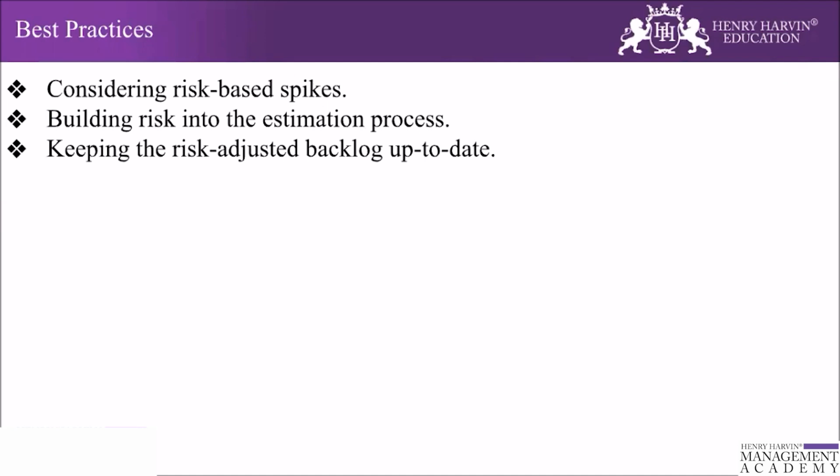For example, we can see that a risk has an expected monetary value of 4,000, and as a result, when it is time to select the requirement or the feature for the upcoming iteration, the risk response action associated with risk 2 now has a similar ranking to requirement number 2. So in other words, a risk response that did not seem to have a compelling business value now makes sense, because we can show that it has an equal value to the organization.